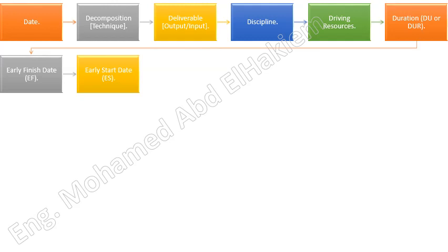Early start date, S. In the critical path method, the earliest possible point in time on which the uncompleted portions of a schedule activity, or the project can start, based on the schedule network logic, the data date, and any schedule constraints. Early start dates can change as the project progresses and as changes are made to the project management plan. See also Activity Early Start Date and Project Early Start Date.